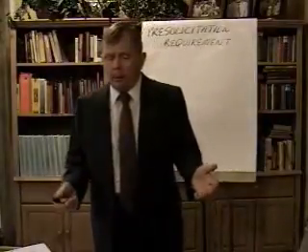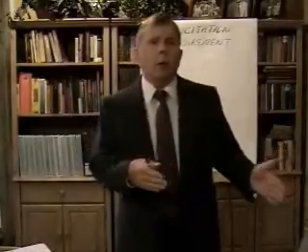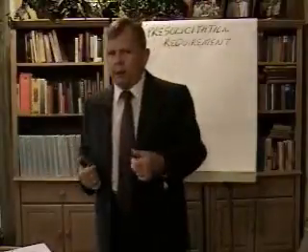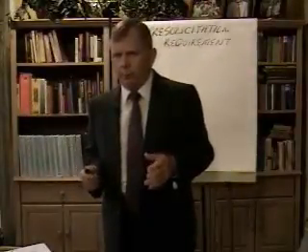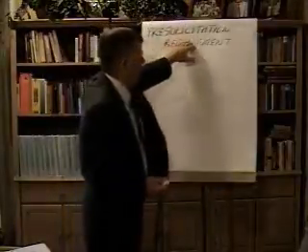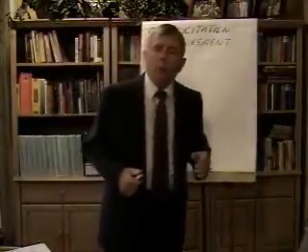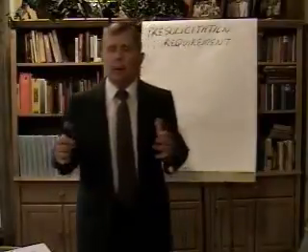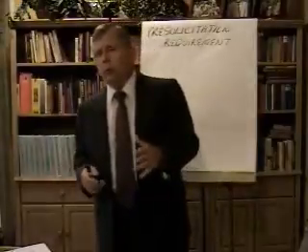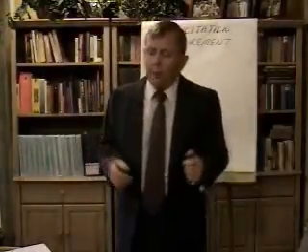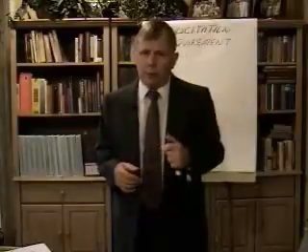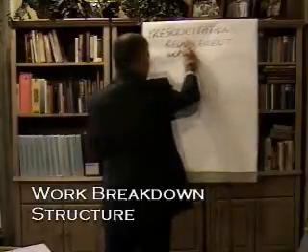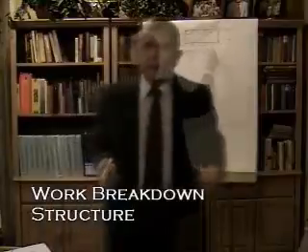Now, under services, we would identify the characteristics of the service that's going to be performed. What is the output? What is the overall objective that we have the contractor performing? In a requirement, for services, we would have a statement of work. And before you do your statement of work, we really should do a work breakdown structure. In a work breakdown structure, it's a graphic representation of what it is we want the contractor to do.